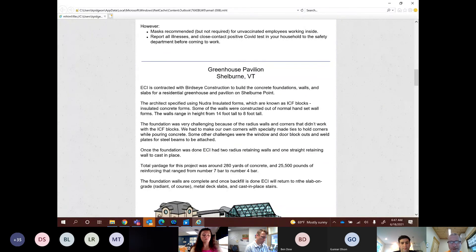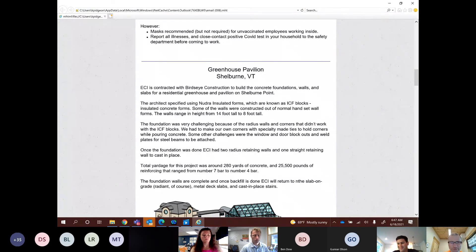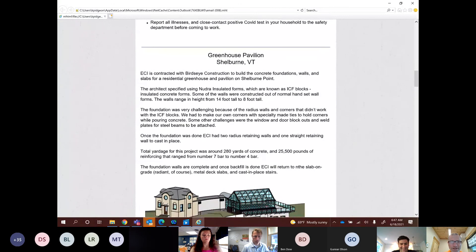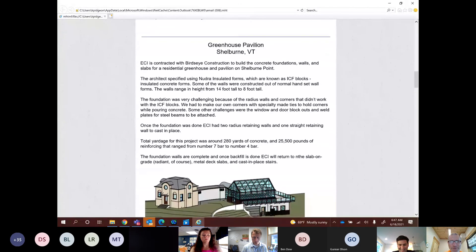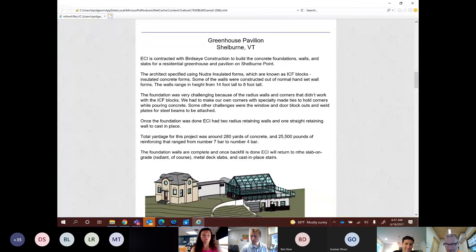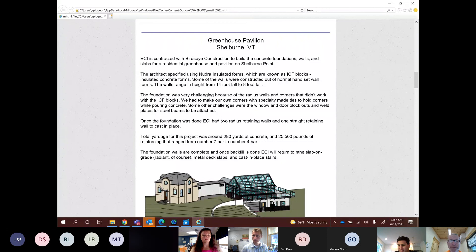Some other challenges were window and block outs into the walls and welded steel plates for beams that would be attached later. Once the foundation was done, ECI had two radius retaining walls and one straight section of retaining wall to cast in place. Total yardage for this project was 280 yards of concrete, 25,000 pounds of rebar, ranging from number seven to number four. So that's pretty impressive that a greenhouse has concrete foundation to start with, much less that it has so much that it requires number seven bars. So the foundation walls are complete and once backfill is done, ECI will do the slab on grade, which is radiant, of course, and metal deck slabs and cast in place stairs.